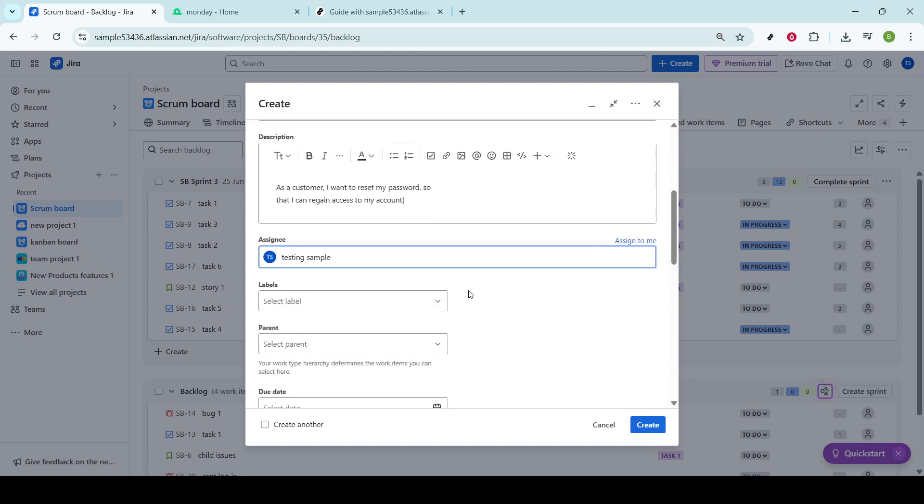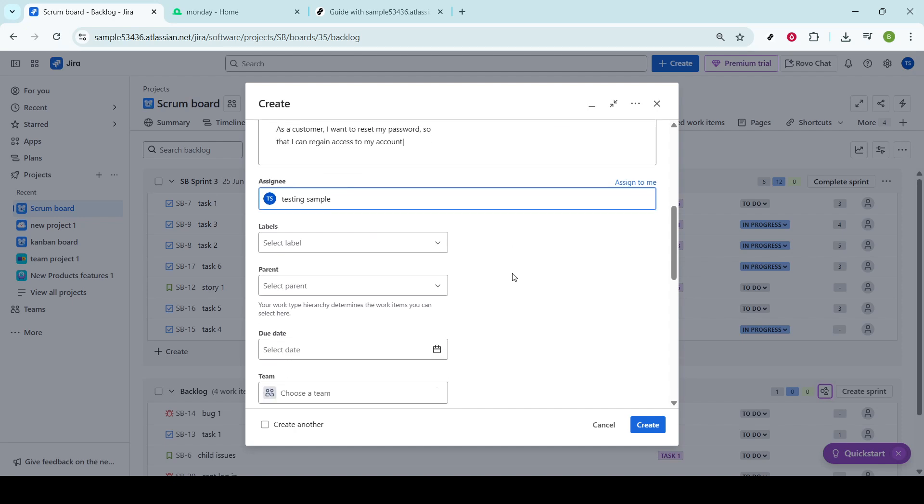Also, consider whether this story should be linked to an epic. Epics are larger bodies of work that are often divided into smaller, more manageable stories. If your user story is part of a broader project, linking it to an epic can help map its place within the larger strategy.